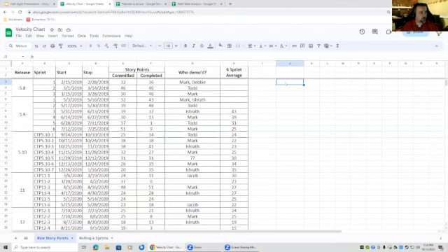So if they have a rough sprint, like, hey, this was the first time we've ever integrated our software with a third party, and we thought it was going to be easy, and it was a nightmare. So we're going to create a checklist the next time we have to do an integration with a third party. Don't forget this, don't forget that, which could also be part of their retrospective artifact, which we'll talk about. So teams are starting to also use this to keep sprint by sprint notes of good sprint, bad sprint, a lot of vacations, a lot of COVID sicknesses, whatever.